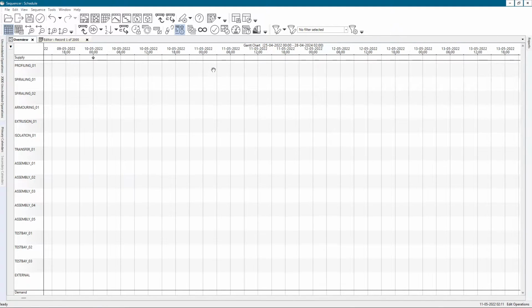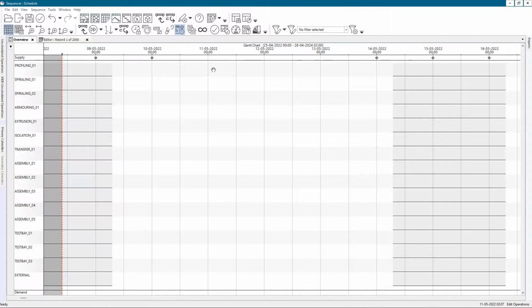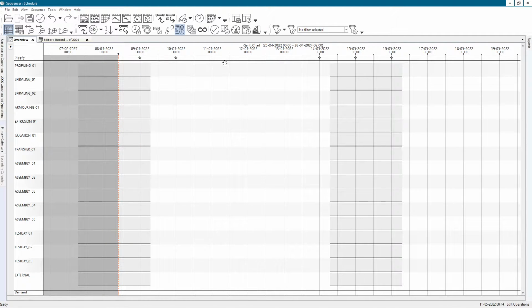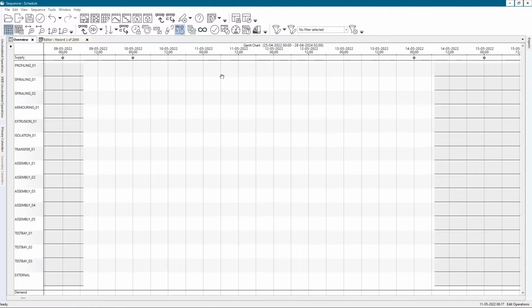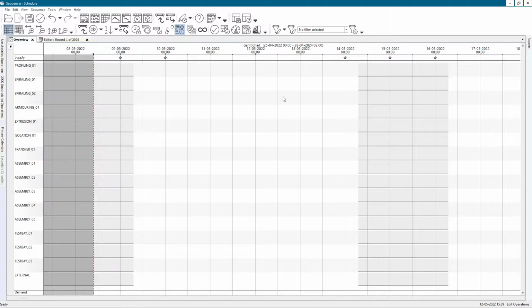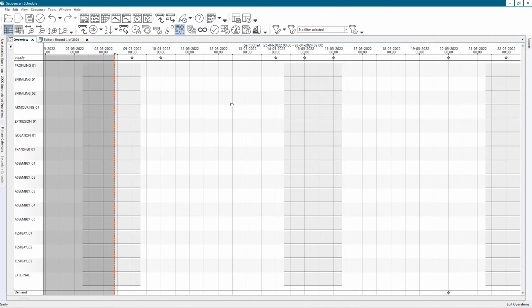If you zoom in or out, you see that the quantity, the frequency of a gauge line varies. So for example, keep looking at this position here, and you see a new gauge line appearing or disappearing depending on the scale that I am at the moment. That's because Opcenter APS is recalculating the frequency of gauge lines depending on the scale of the timeline.